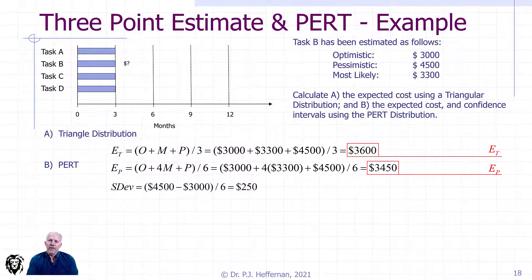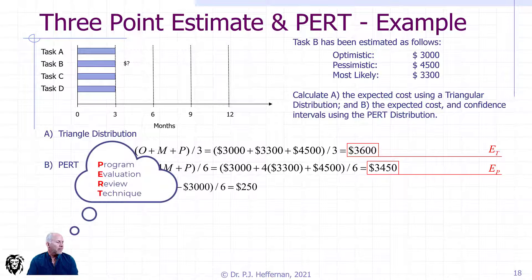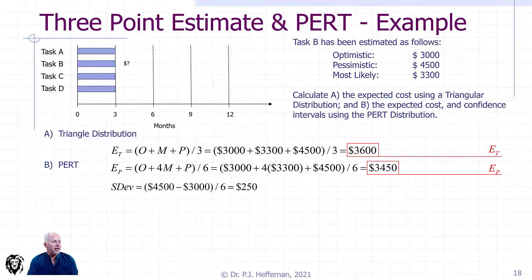Because we've used the PERT, the Program Estimate and Review Technique, we can also calculate the standard deviation. We take our pessimistic, subtract our optimistic, divide by six, and we see that we have a standard deviation of $250.